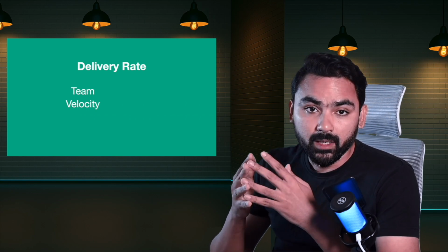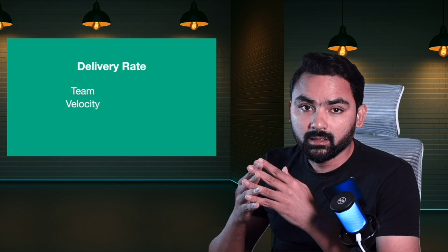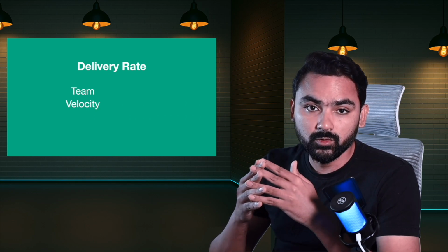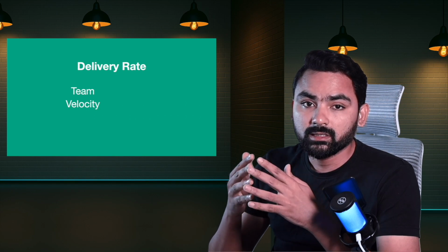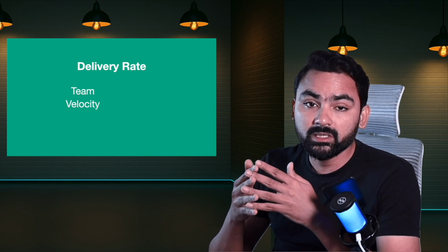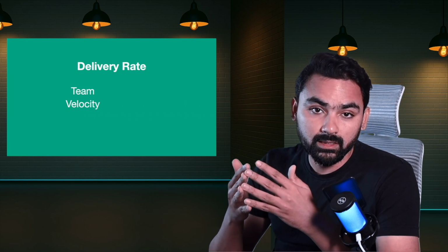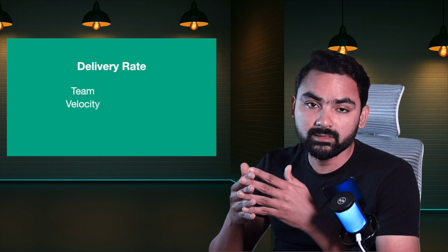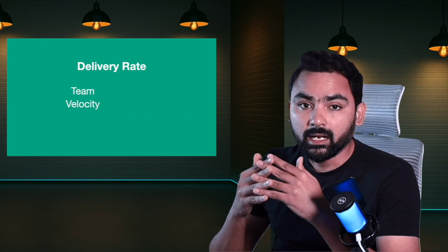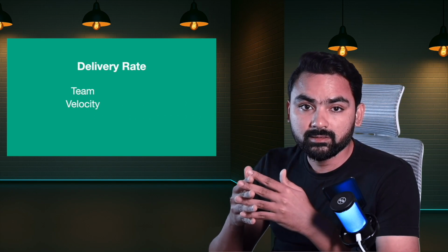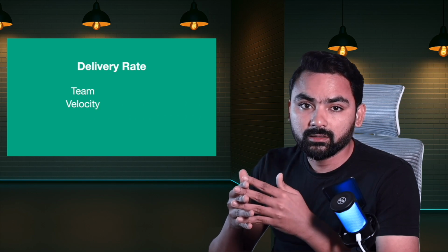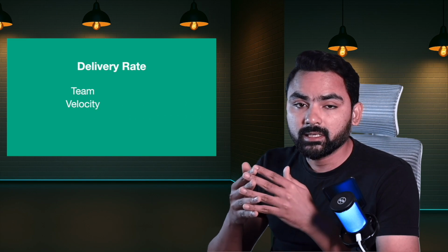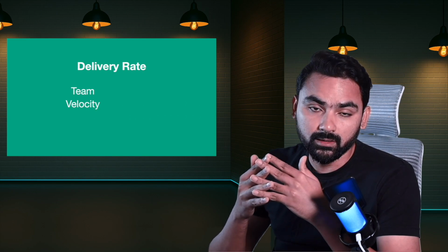Apart from that, we also need to take care of any dependencies that would raise challenges in coming days during the development. We need to make sure the respective team that our team is dependent on, or if some other team is dependent on our team during the development phase, we have their presence in the sprint grooming or planning sessions, understand and set the expectations, come to an agreement and document the requirements or responsibilities of each team, so that it will help us in coming days during the testing or release phases.